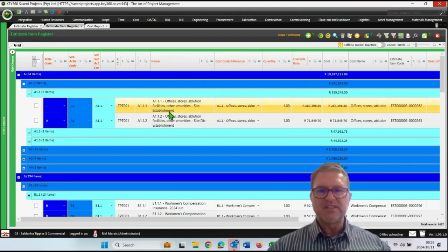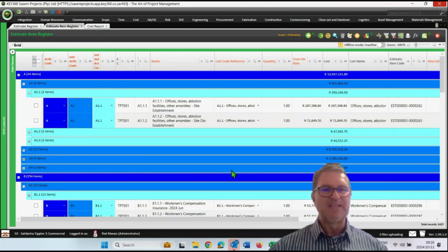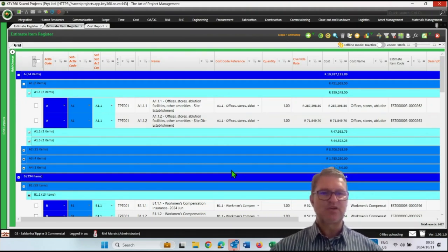Each of these line items in my estimate must link to a cost bucket, because in the end of the day, I want a cost report with cost buckets. Now I'm going to place contracts, or I'm going to place purchase orders, against a specific cost bucket. So the estimate, as we said, is an estimate. We guess a value. So we create cost buckets. And then when we decide we're going to go on and the project starts, we start to place contracts with contractors and suppliers. We place a purchase order or a contract with them. So we commit money against the cost bucket.